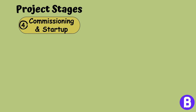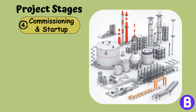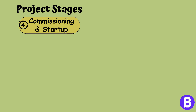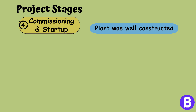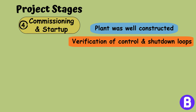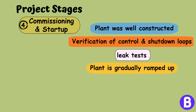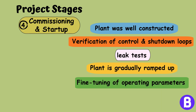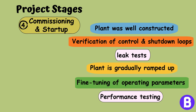The final stage is the commissioning and start-up of the facility, where the process design comes to life as the plant is brought online and begins to produce the desired products. This critical phase includes ensuring that the plant was constructed as per the design, verification of control and shutdown loops to confirm they are well tuned and their logic is implemented as per the design, carrying out leak tests to ensure flanges are not leaking, addressing any issues that arise during start-up, gradually ramping up to full production capacity, fine-tuning of operating parameters to ensure the plant meets its performance targets, and performance testing of all equipment to hand over the plant to the client.